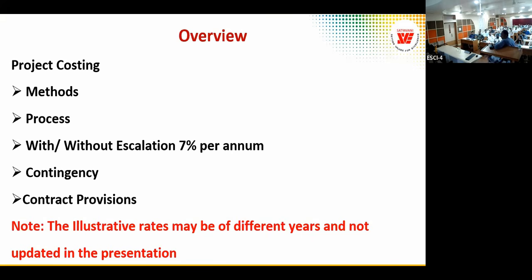One contingency. That is allowed in the DPR actually. Contingency of 3% to 4% is allowed. I can add it to the cost and take the approval so that I can increase my project cost by that amount when I am really tendering. In the era of Trump, price adjustment and contingency both are important. Was important. Very important. Correct.